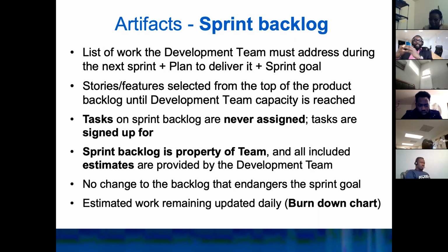Once you have the story points, you keep adding them up, and you already know the capacity or velocity of the team. If it is 80 points, then you keep taking stories from the highest priority to the lowest till you reach those 80 points. Every time you do the sprint planning, that's the approach you're following.